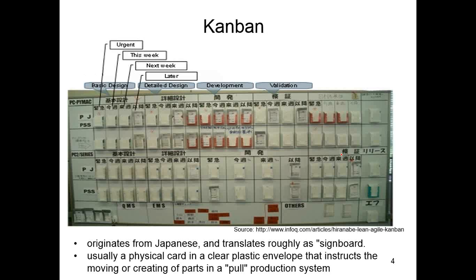So as we mentioned, before Kanban got introduced into software development, it was being used heavily in the manufacturing industry. The origin of Kanban happened in the Toyota production system, where Toyota used plastic envelope cards, which they used to call Kanban cards, as a way of signaling the need to create or move inventory. One of the basic objectives of Kanban in the Toyota manufacturing system is to ensure that the wastage which comes due to overproduction is avoided.